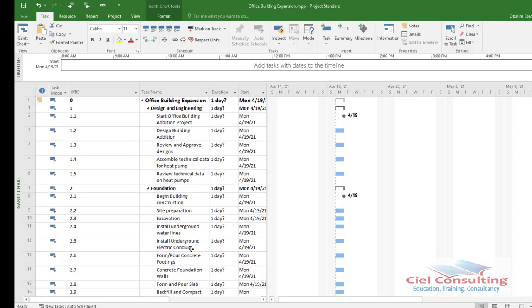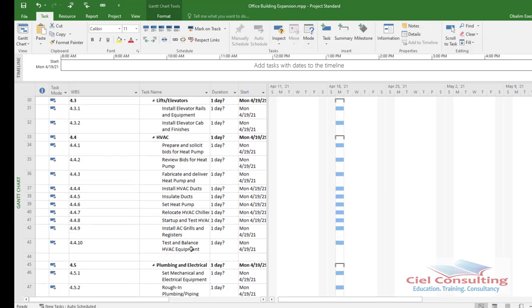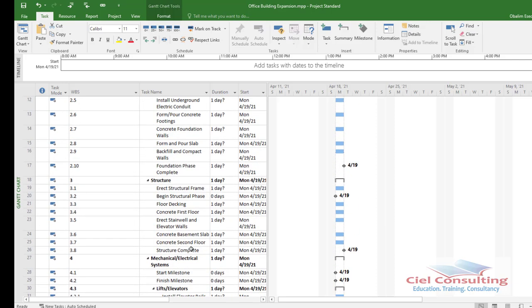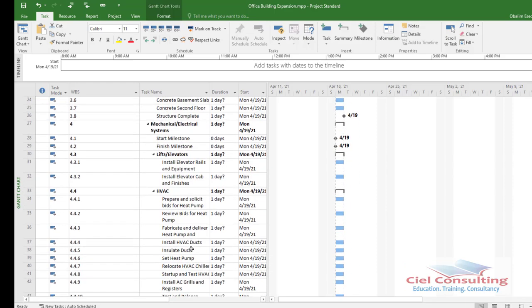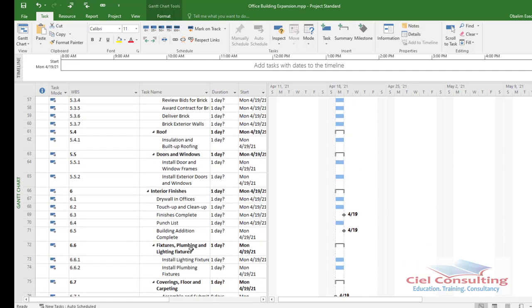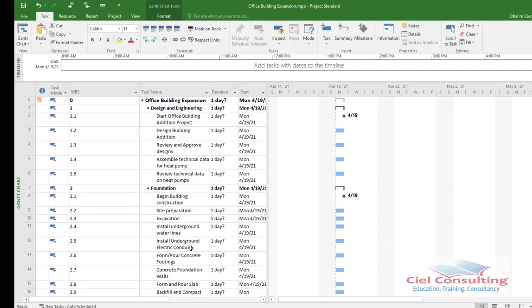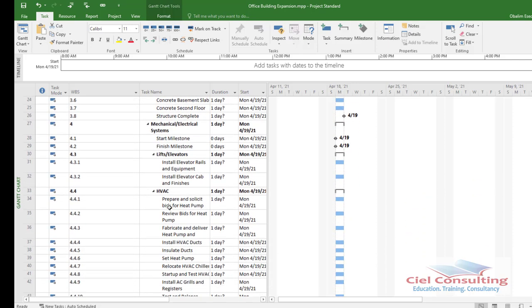Okay, so I decided to use a live project, at least to make it as real as possible, instead of just giving you a sample project that has maybe 4 or 5 activities. So this probably would drive it home a little bit. So the point I'm trying to make is that within your project, you can have your phases of your project, and directly under the phases activities. Now there are some phases that will have some sub phases, if I may use that term. So those sub phases are what we refer to as our work packages.